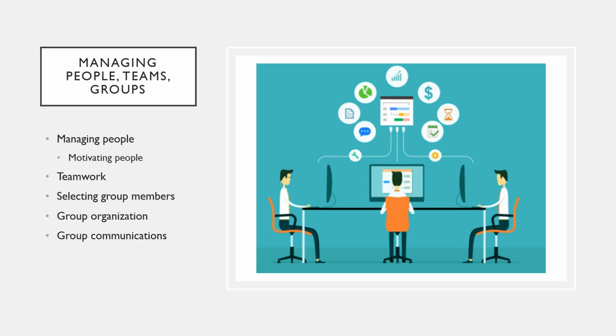At the same time, focusing on the super programmers can be demotivating for other group members who are resentful that they're not given responsibility. They may be concerned that this will affect their career development. Furthermore, if a super programmer leaves the company, the impact on a project can be huge. Therefore, adopting a group model that is based on individual experts can pose significant risks.